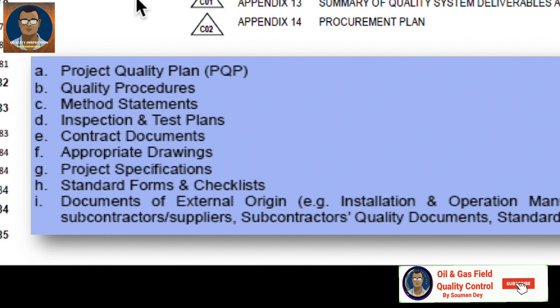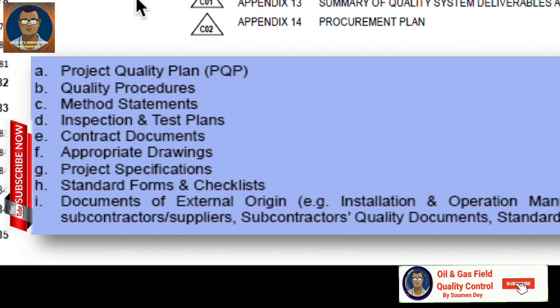A project quality plan not only contains the plan itself — it is also accompanied with many attachments. The first is the project quality plan document itself. It can be associated with quality procedures like welding, lowering, special process procedures, concrete, finishing of concrete, and repair methods. Also method statements, inspection and test plans, contract documents, appropriate drawings, project specifications, standard forms and checklists, documents of external origin such as installation and operation manuals from subcontractors or suppliers, subcontractor quality documents, standards, etc.